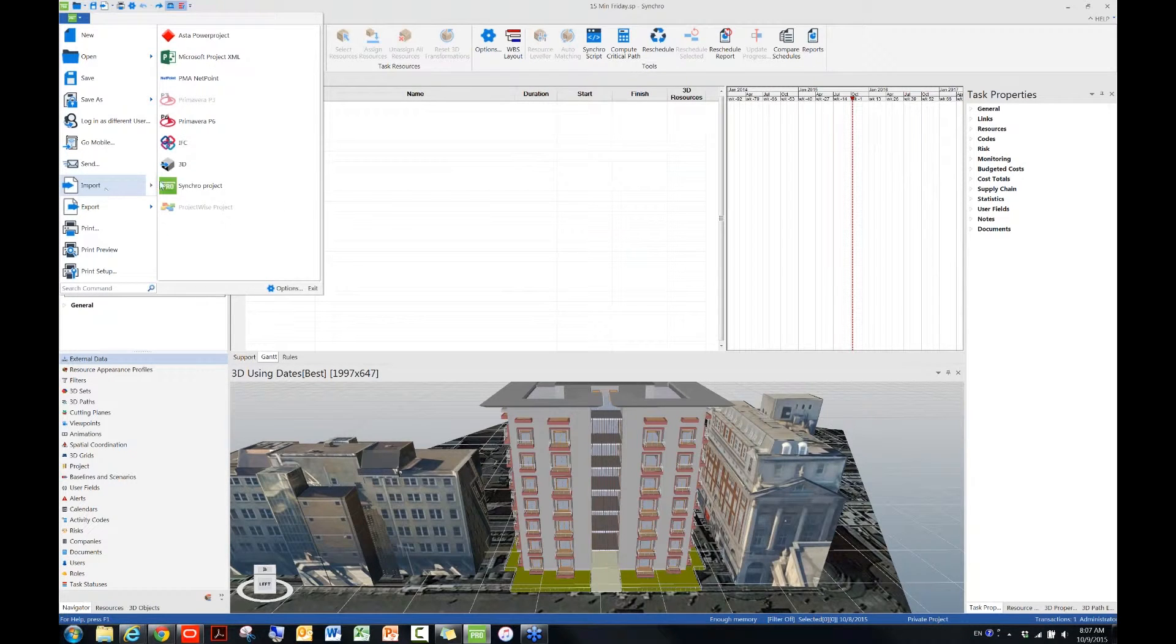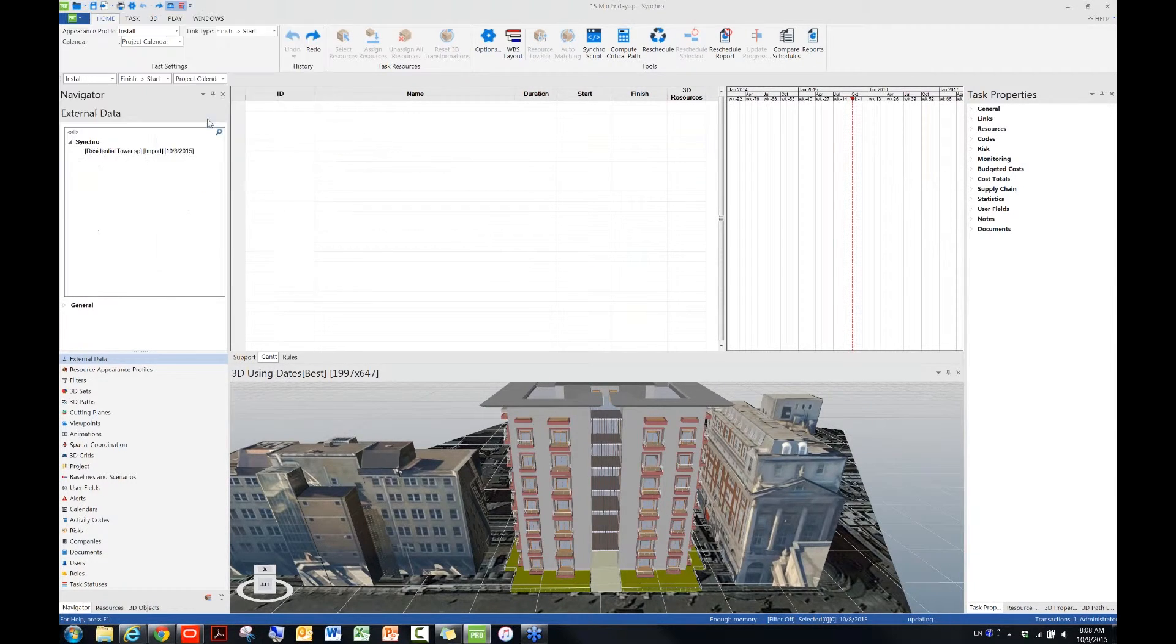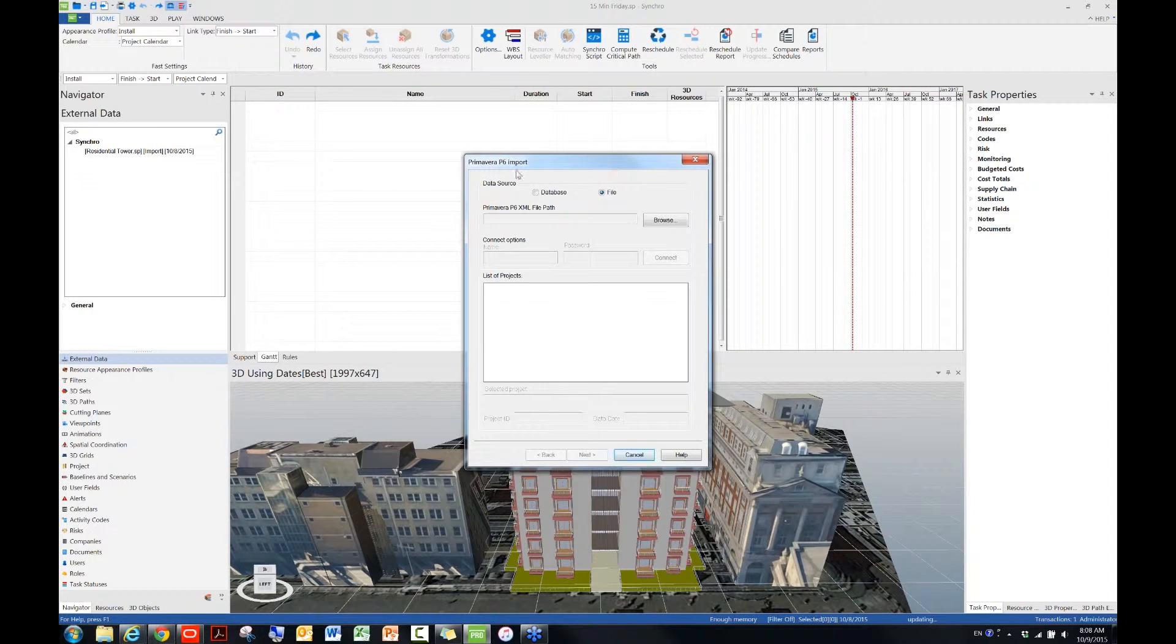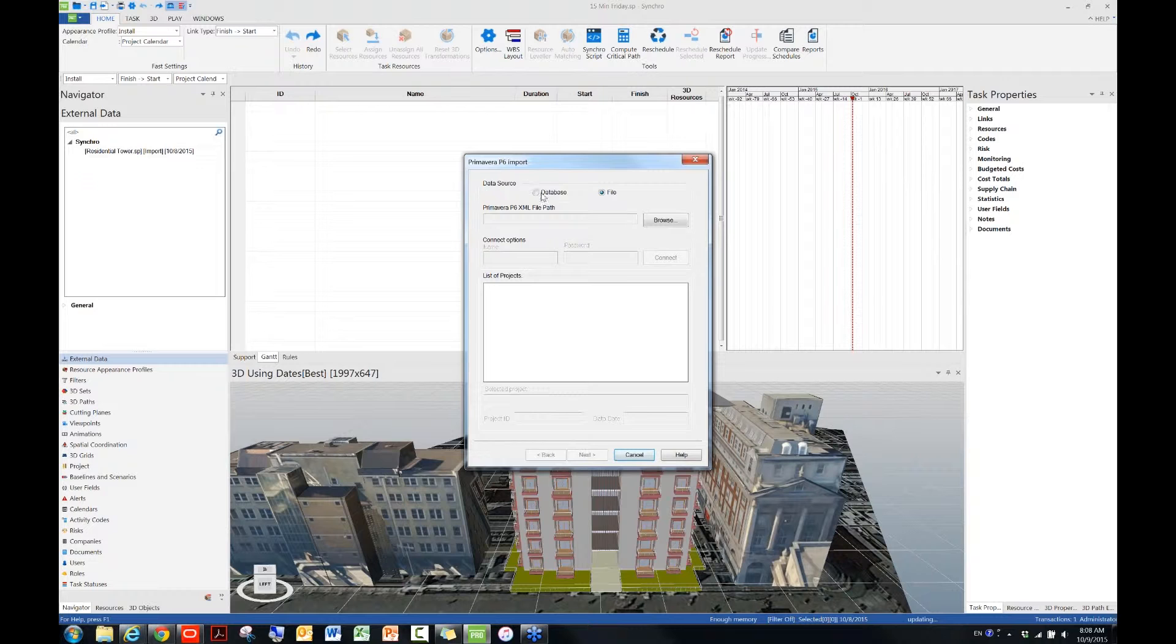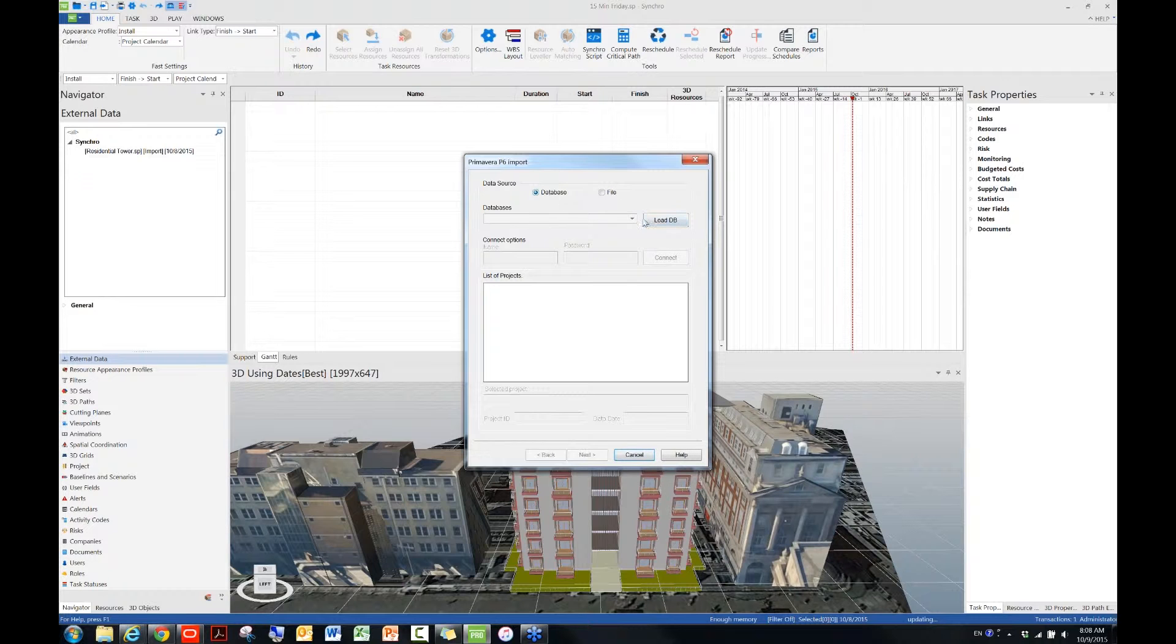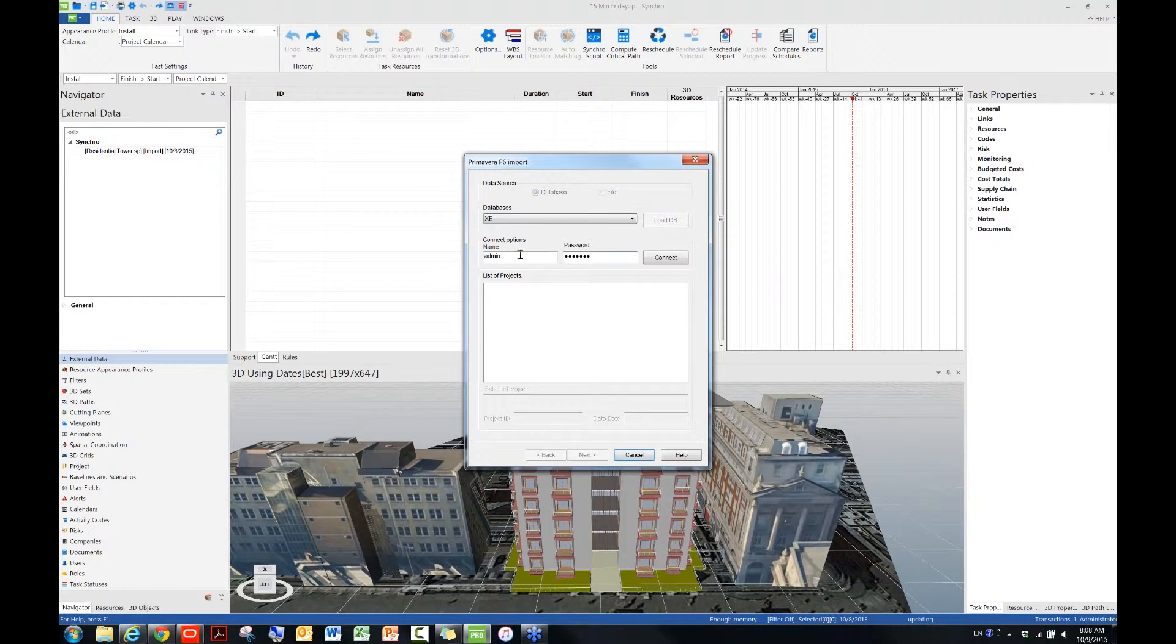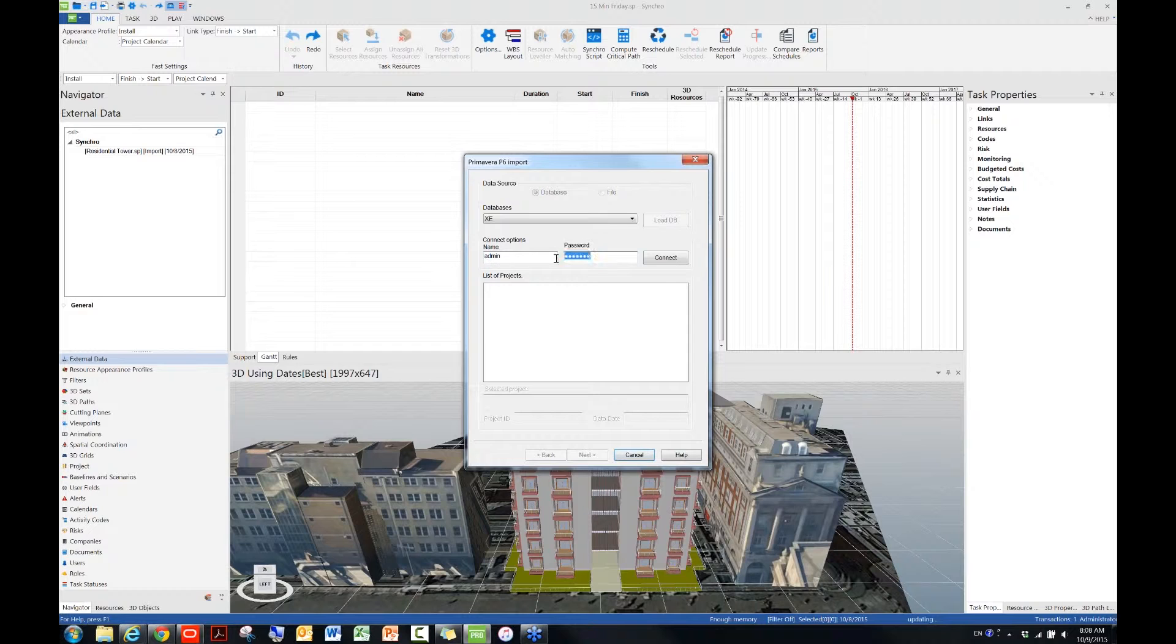Go to import, and then click on P6. Okay, different from the first method. Under data source, I will choose database this time, because I have both P6 and Synchro installed on the same computer. And then the next thing I want you to do is to load database.